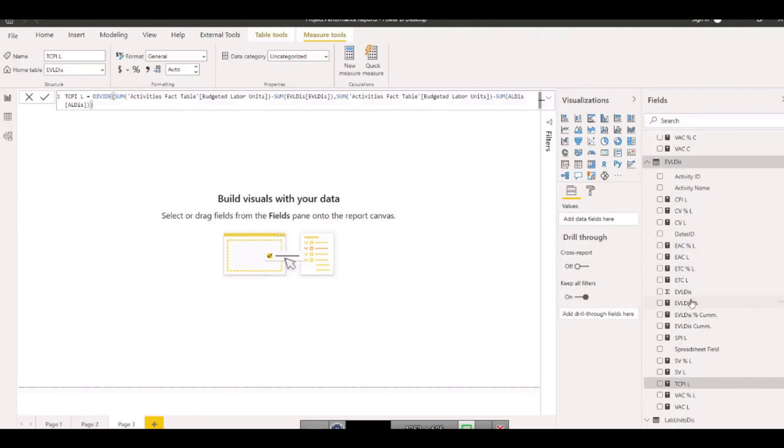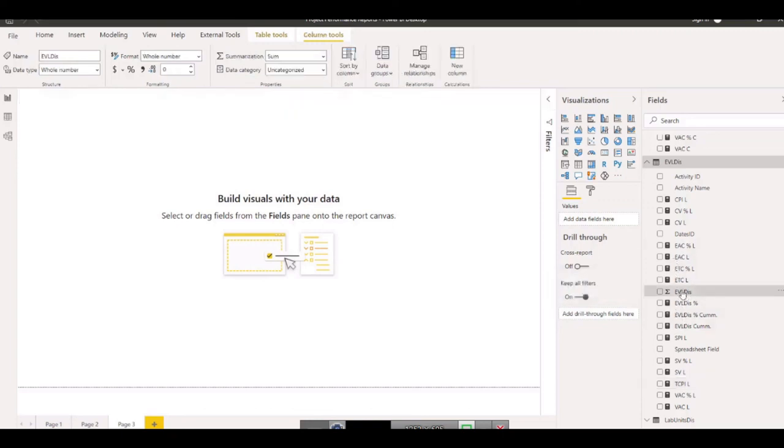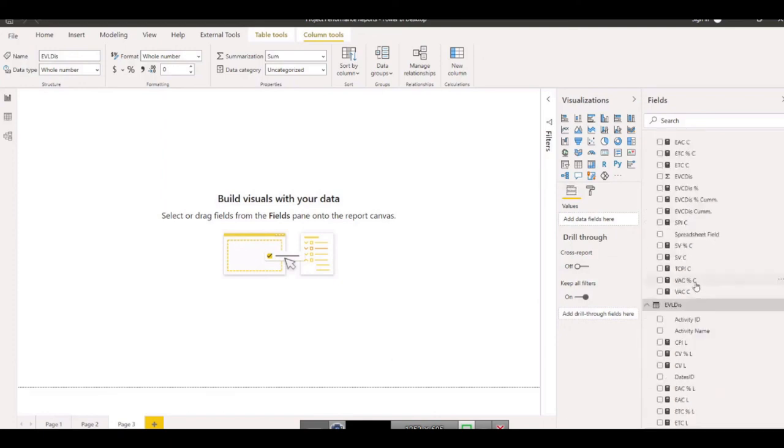These are different values, but the source is always the same. The source is always changed in the source, meaning the source for all these KPIs is earned value, because I am creating all the KPIs from earned value, planned value, and actual cost. If these values are changed inside Power BI, this is not the correct way. These values should be changed in the data source, which is P6. So you need to make sure your earned value, planned value, and everything are changed in P6 once you update them, and then you bring them in. And now you know how to create KPIs.